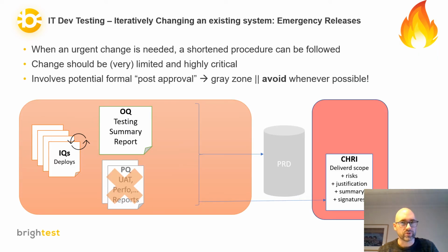What do you do when an urgent incident comes in that needs software changes? In that case, a proper risk assessment needs to take place to make sure that the risk of having this bad situation in production is higher than the risks associated with a quick fix. But if the risks are very high, it's important that we can fix things quickly.